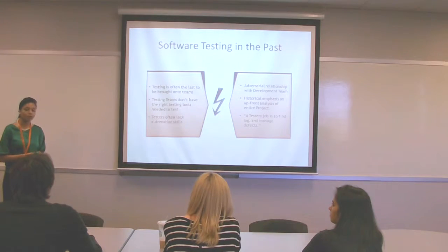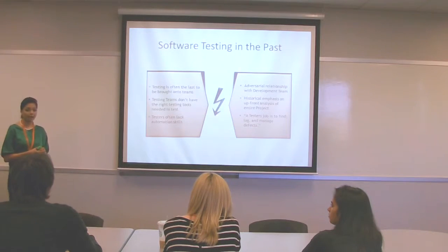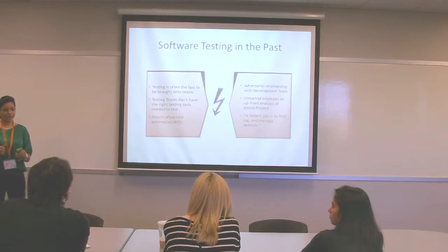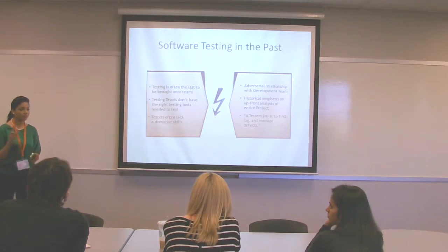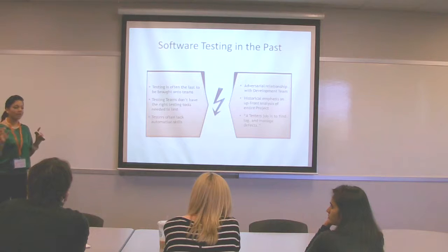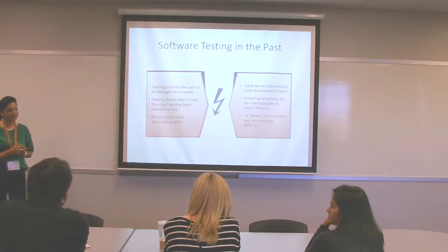We do 2-week iterations. We release things to production in 2-week iterations. And you know how they worked? They had their sprint backlog, stories, everything. They developed the stories. Let's say Friday is the end of the sprint. Tuesday, testers will get everything, or the 4 stories that they have developed in that iteration. From Tuesday to Thursday, they will test. Thursday morning, they'll let the team know if they have found any fixes. Friday, they'll do the paperwork to get it released on Friday evening. That's not Agile. That is iterative waterfall.